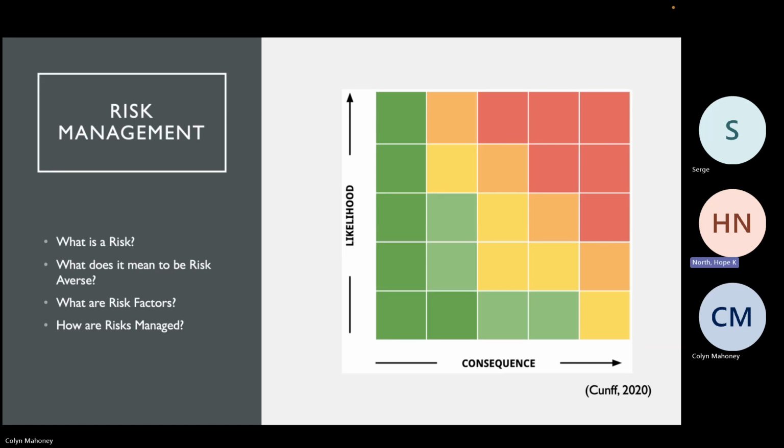Can you explain the graphic on the slide? So this is a picture of the NASA 5x5 risk matrix. It gives a visual representation of any risk by assigning it a value between 1 and 5 for both likelihood and consequences. Then you use those values to plot the risk on the matrix to get an idea of how critical a risk is.